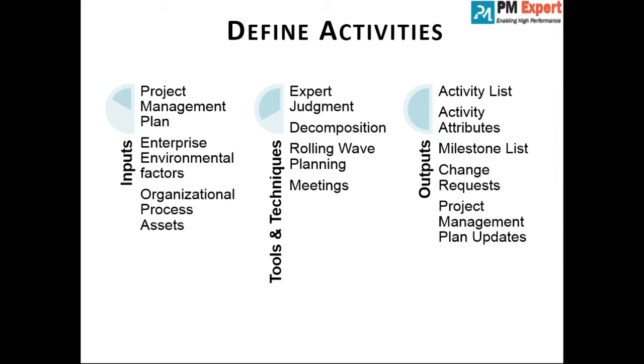See, a discrete activity will contribute to the project deliverable, will lead to creation of the project deliverable, whereas there are some level of effort activities which will not contribute to the project deliverable but will be delivered for the project. For example, maintenance of server and the basic activities, cleaning the work area and all, which are done on a regular basis. So the cost of the activity should be billed on the project. That's why they are called level of effort, but they will not contribute to the project critical path. They will not contribute to the project schedule.